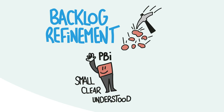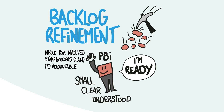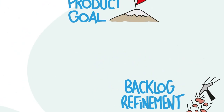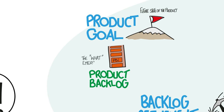Backlog items that are small enough to be completed in a sprint are considered ready. The whole team is involved, stakeholders can be invited, and the product owner is accountable. The product owner defines work for the team using the product backlog. The product goal describes a future state of the product, and the rest of the product backlog emerges to define what will fulfill the product goal.